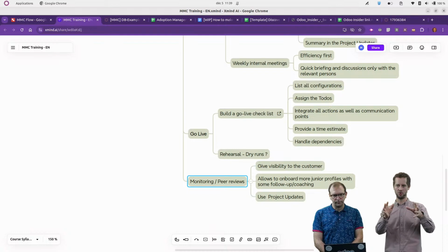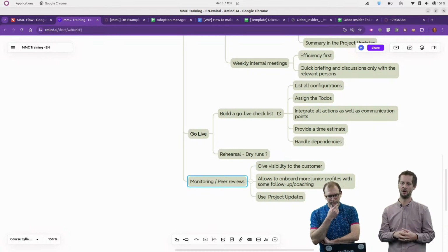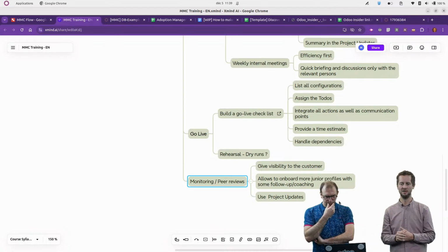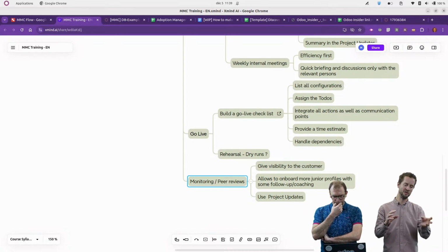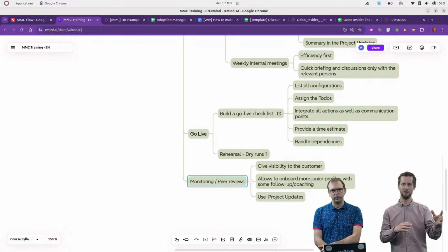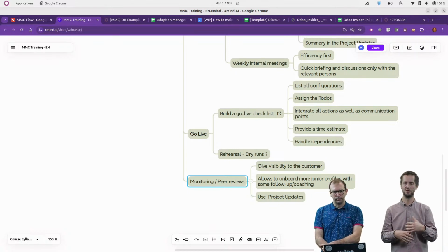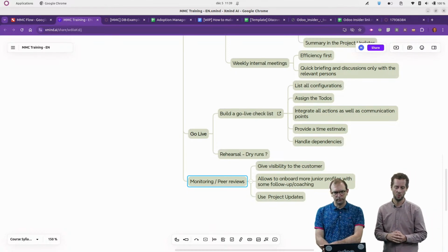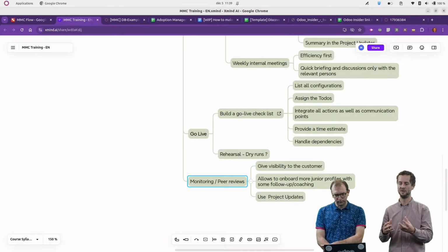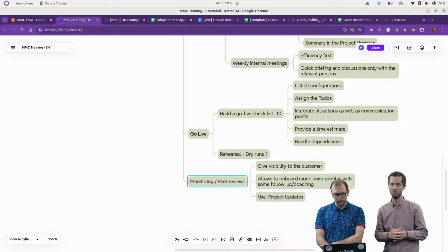I'm looking at the project tool to see a bit how the tasks are organized, to check if there are a lot of change requests, new requests, if the tasks are correctly specified, if the needs are clear, etc. But also to check how the planning looks. Do we have to update the planning all the time? Does the budget change quite frequently? And just taking some step back and an external view can also help the team to spot some places where we can bring some improvement.